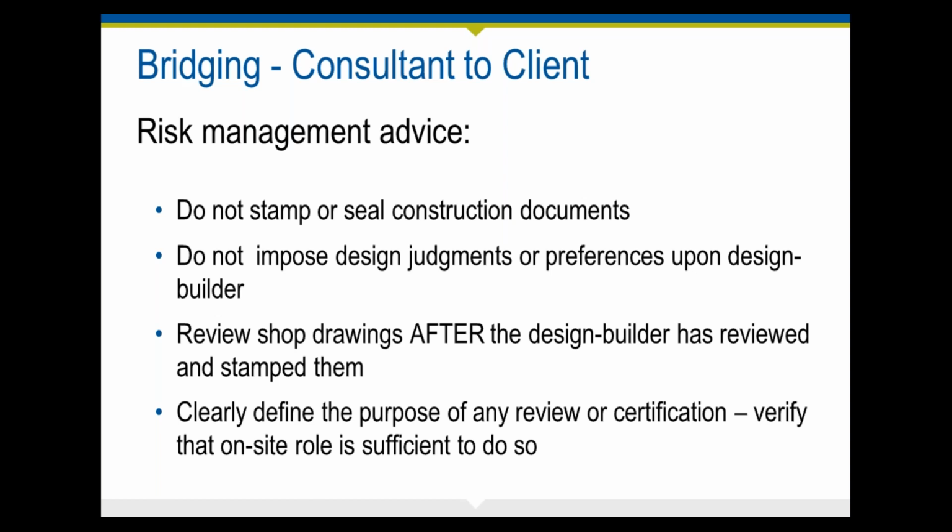Ultimately, the design builder should have the responsibility for the design and construction of the project. So you, as the independent design professional, may try, in the interest of the client, to influence the design builder's design decisions, but you should not impose your design judgments on the design builder. Especially if you're developing bridging documents, you want to be able to give the design builder enough flexibility to come up with solutions on their own. Otherwise, you may be construed to have assumed some level of responsibility for the design.